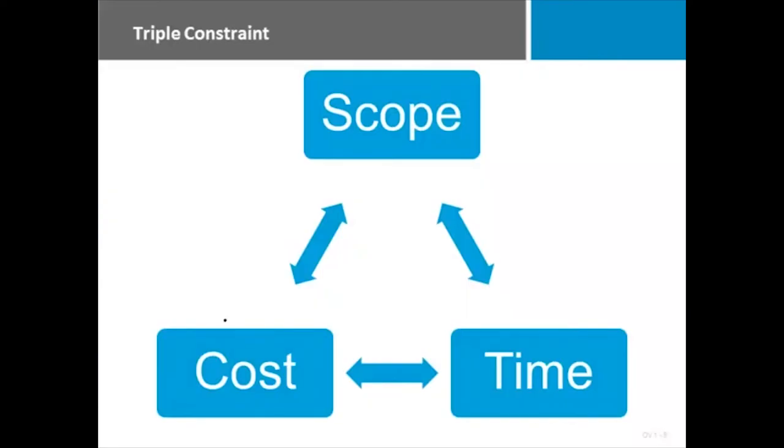I want to focus on three of the knowledge areas and view them as a triangle, and that is scope, cost, and time. We call these the triple constraint because if inside of your project you modify any one of these three things, the other two are going to be impacted. I drew a triangle here just to show you. Let's say I have scope here and I have time over here on this side and I have cost down here. Let's take an installation of a refrigerator in a new home that we're building.